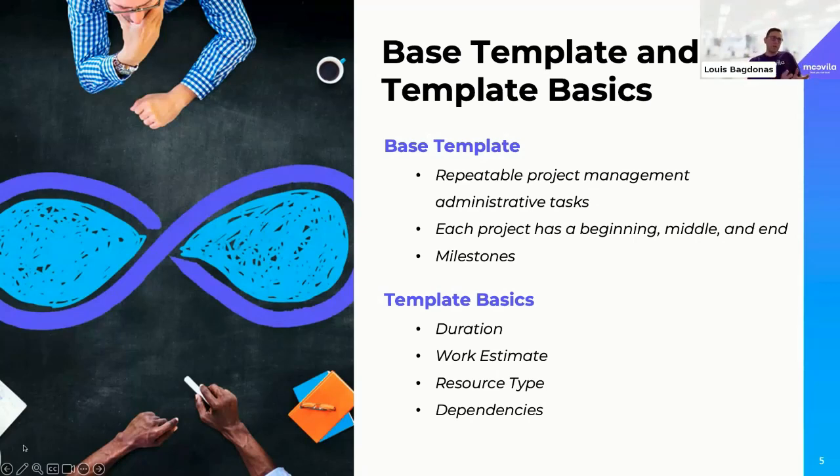And then within that base template, where are our milestones? To that point, everybody signs off and agrees on that work plan for this project. That's a milestone. You want to know and make it clear for your team and your customer, hey, this is when we're all going to agree to the plan. We're all going to do this together. We're going to check that box together and mark this task completed.